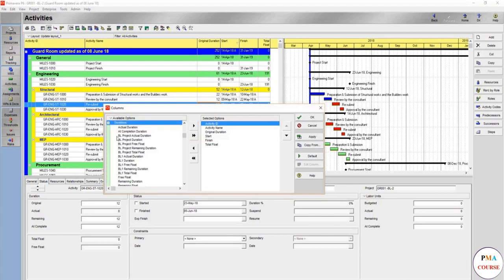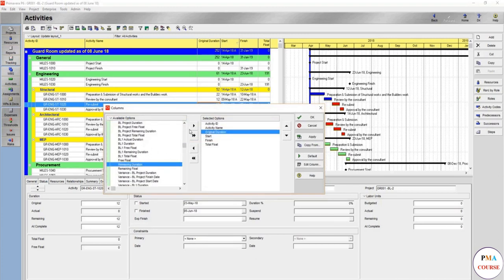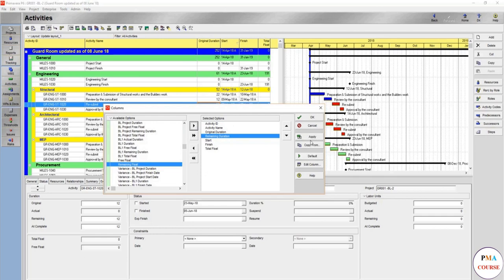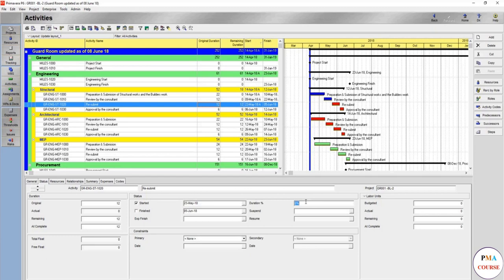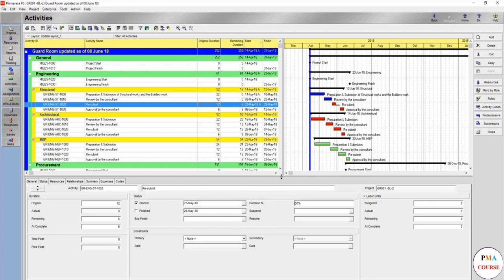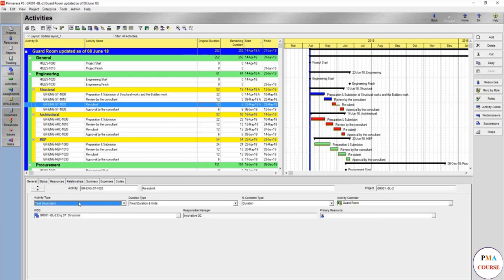Let's show the remaining duration column. Remember what activity type are we working with. If we made the duration percentage here, it's clear that we are working with duration percentage. So 50 percent, this one will go six days. But what if we don't want this? Yes it's finished 50 percent, but we need another 12 days.